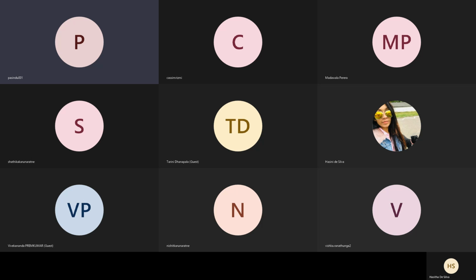Once you know the scope, you will have to come up with an estimate: how long it would take, what the time frame is, what kind of resources you might need. Then you would work on the time management aspect. With time, you know exactly how long it's going to take, and with time, you can do the costing. So that's the logical order of the life cycle, right?